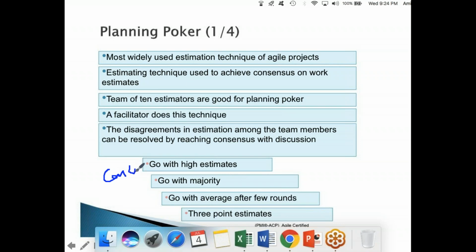Normally they do it in iteration planning or sprint planning just before the start of the technical work, the start of the sprint or iteration, that particular iteration of 2 weeks, 3 weeks, first day, right? They'll sit and they do this planning. So cancel booking, what are the activities they are supposed to do? First, they have to create the button. Then they have to design the button with various colors, give some text, right? And then they have to look into the functionality. They have to verify whether the user has done the booking or not. Really, did he book the ticket or not, right?